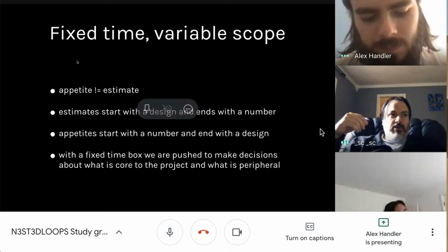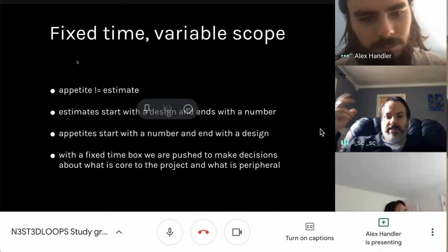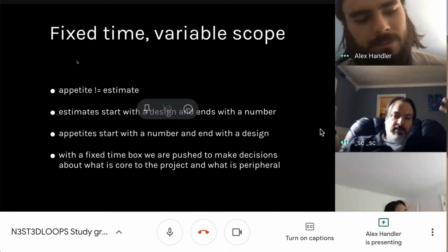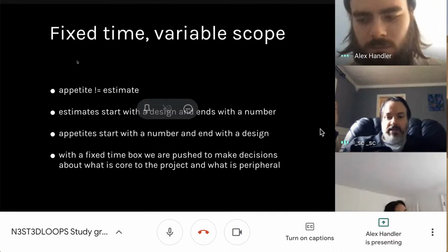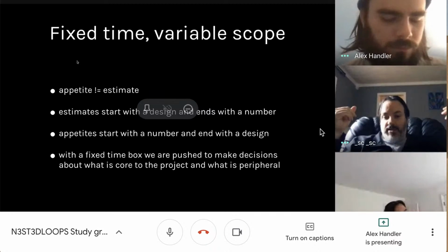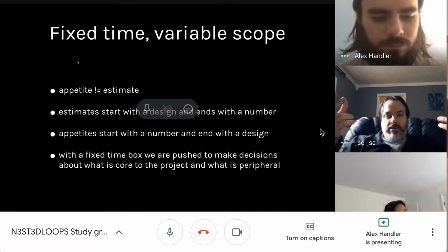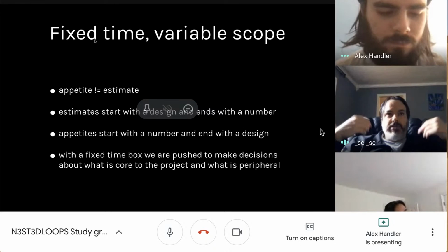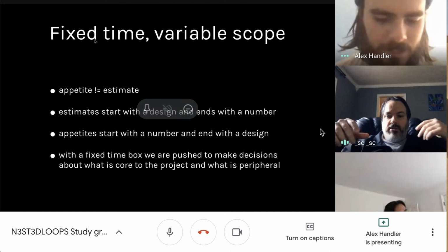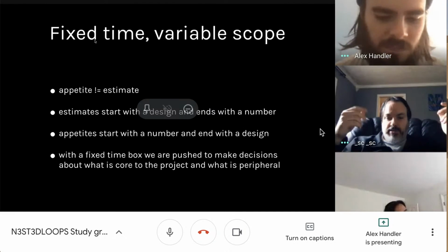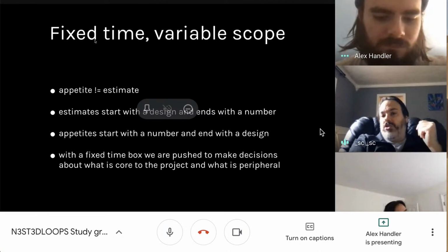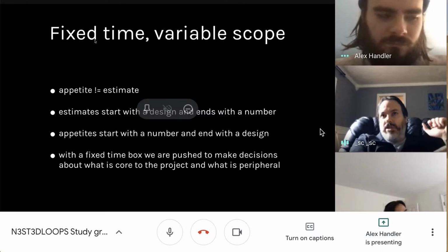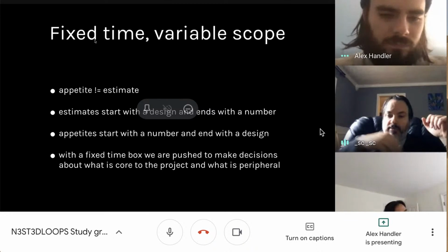Then you discover 6 to 8 months later that we've been going in the wrong direction, or this cannot be done, or we're delayed because people were not communicating. Scrum aimed at resolving lack of communication and roadblocks by having a Scrum Master, whose job is pretty much just to remove roadblocks from the team. Right.